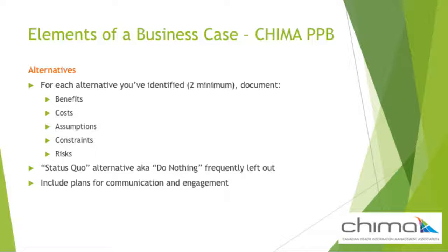Benefits should include metrics, as they will be more readily understood and accepted. Metrics should include high-level numbers in the main presentation, for example, reduce overtime costs by 25%, and will generally have an appendix where reviewers can go to see the actual calculations or what went into determining that number.